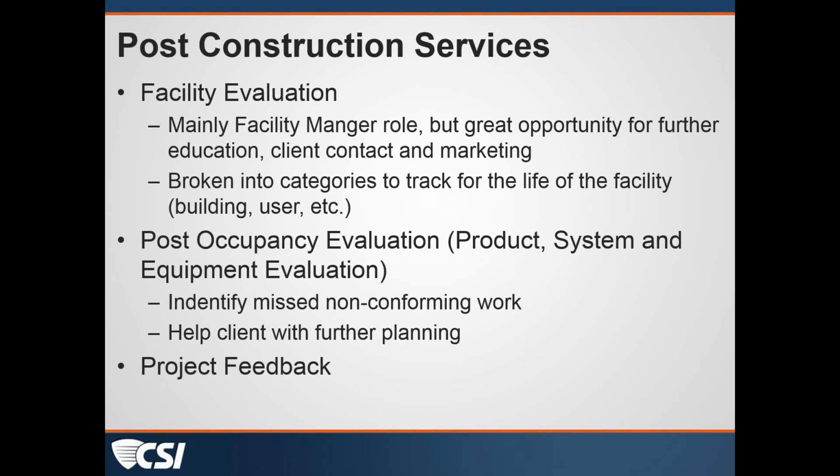And post-occupancy evaluations, whether it's specific products or systems that we use as a designer, whether we can identify things that work that we should carry further into our planning with this client or other clients, lessons learned, if you will. Perhaps we would identify missed non-conforming work that we didn't see in the punch list phase of the project, nor did the contractors. So this is another opportunity for project closeout and doing an evaluation post-occupancy.